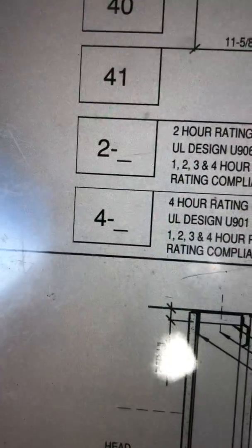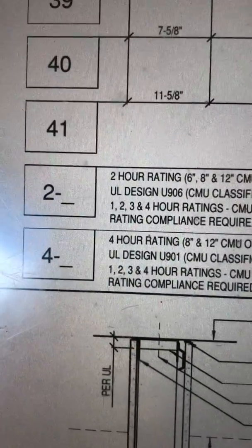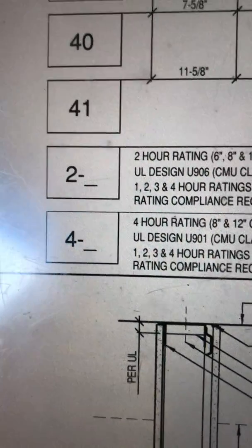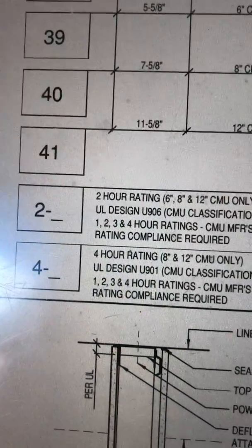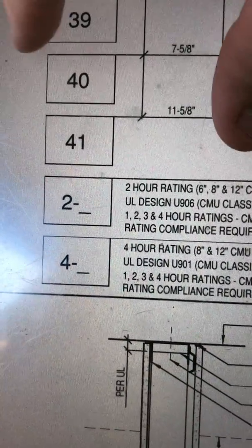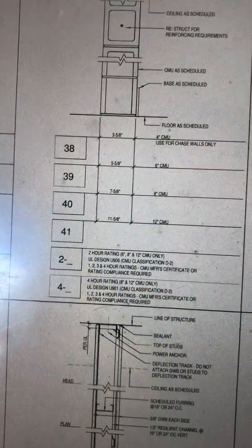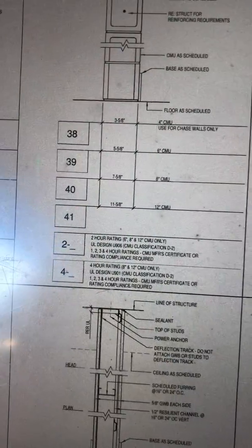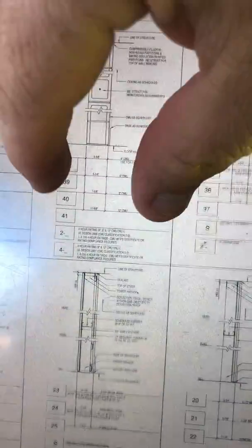And you need to know exactly where those rating blocks go, so you can order the block according to the ratings of the block in your purchase order. And you'll see your purchase order under documents, and it's up to you to order your material.